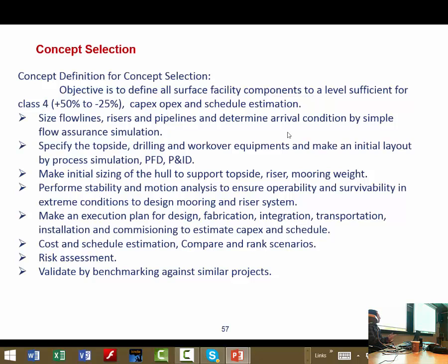But for example, just make an example, for Shell it was a 9-month project, but for Bream it was just a 4-month project. Because we as a contractor, we always try to define some more hours and make more accurate estimation, but operators usually would like to have, yes, quick estimation.